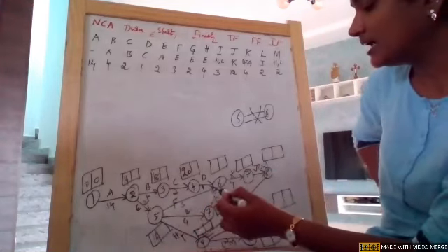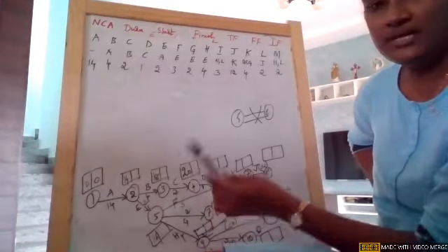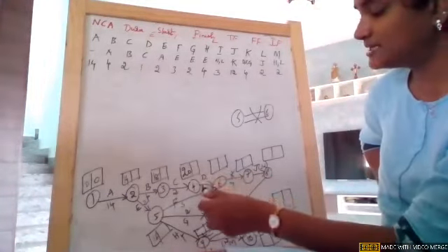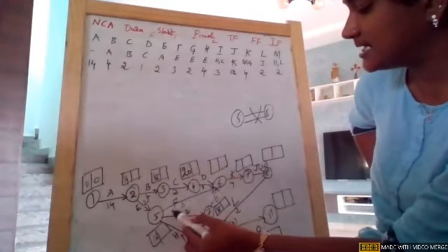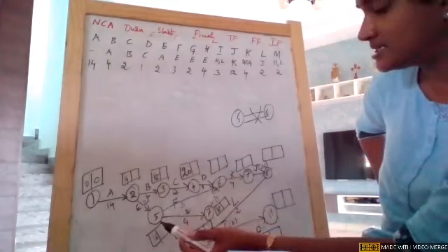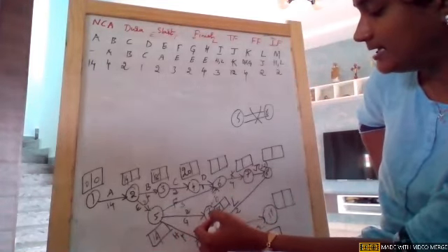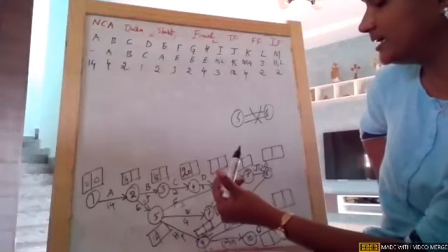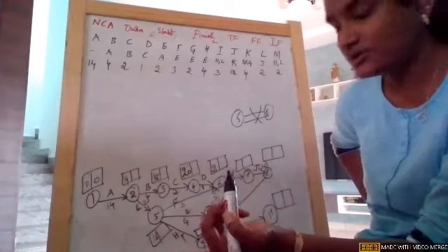So till now, I'll go to node 6. I think we got the durations of the 3 arrowheads. 20 plus 1 is 21. One arrowhead is giving that duration. The second arrowhead, 16 plus 3, is 19, another duration. The third arrowhead is giving us 18 plus 0, which is 18. So 21 is the maximum duration. I'm writing 21 on node 6.